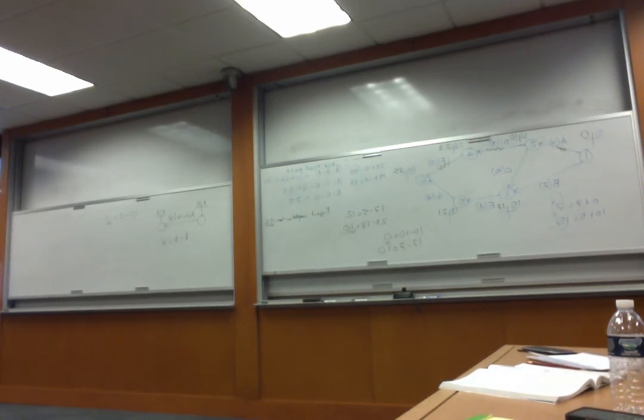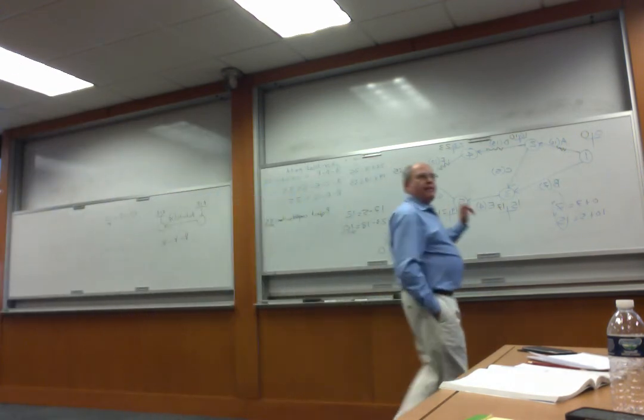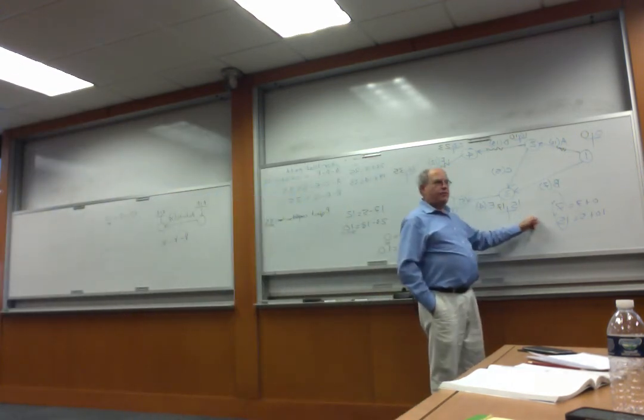Now this is very useful information. What does it mean practically? Let's assume you have 10 people working at B, and you take half of them away. Instead of doing it in 7 time units, how long is it going to take? Double. It's going to go up to 14. I can tell you, we're not going to do it, but I'm telling you the practical implication of knowing how much slack we have.